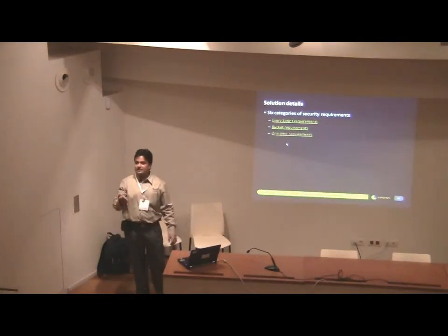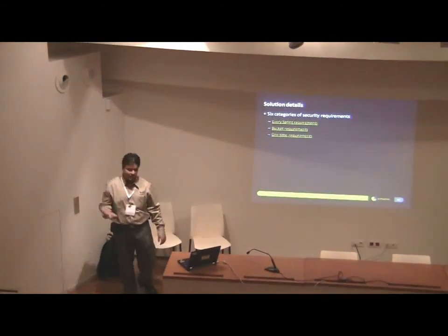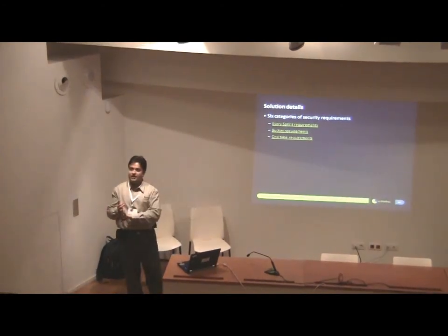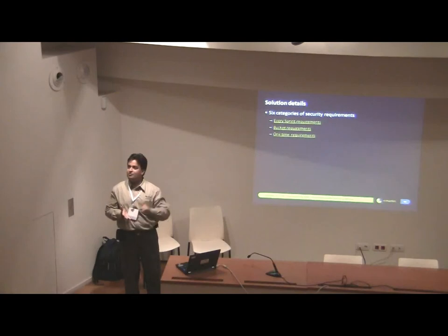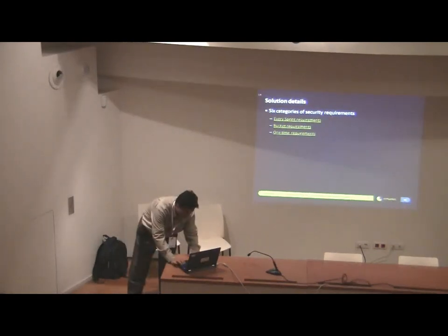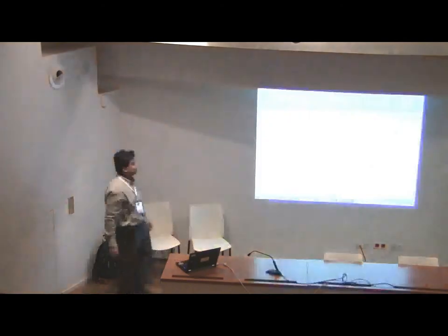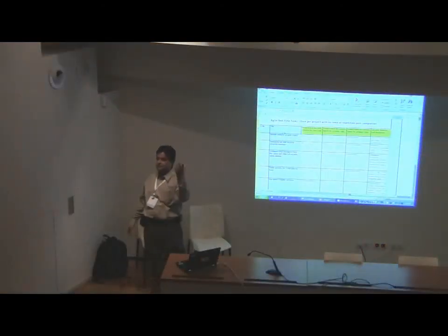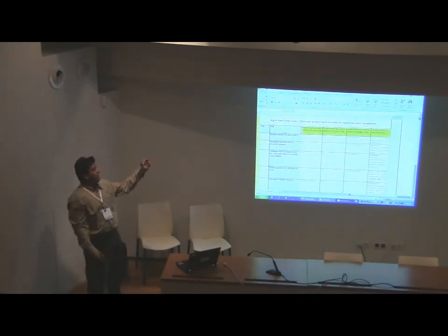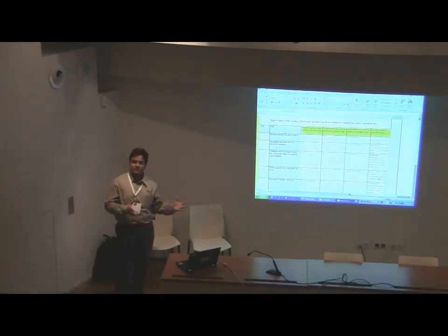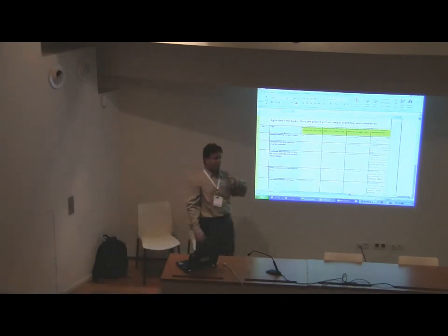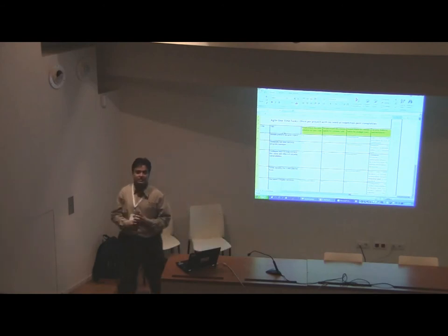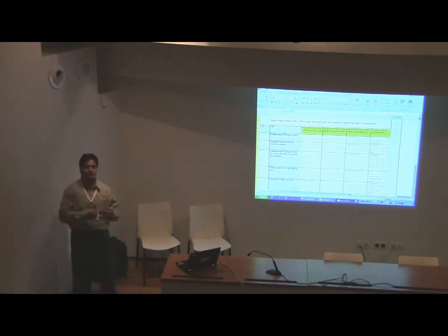Okay, then we have something called one-time requirements. Again, every sprint, bucket, and one-time have been retained as it is from the Microsoft SDL document. So one time is essentially you do it once per project, okay? And typically there is no need for repetition. So one favorite example I have is you designate a full-time security program manager. Yes. Once during the project at the beginning,